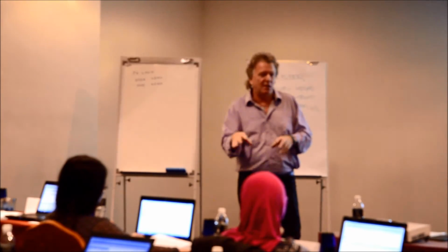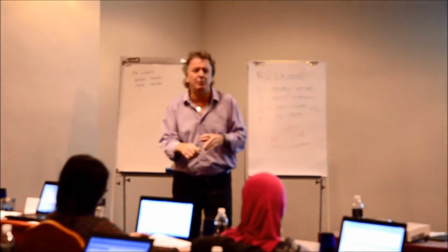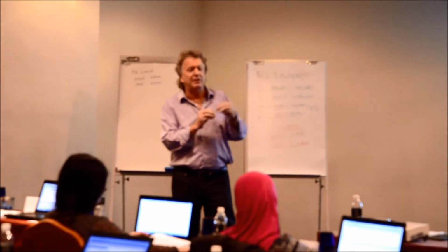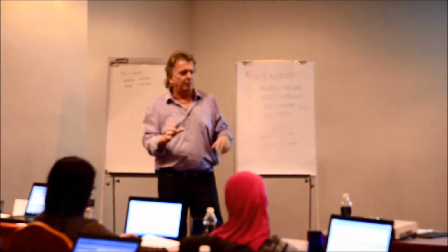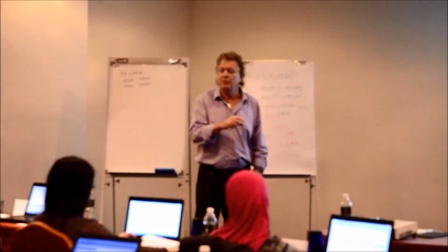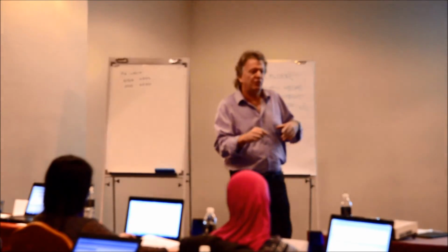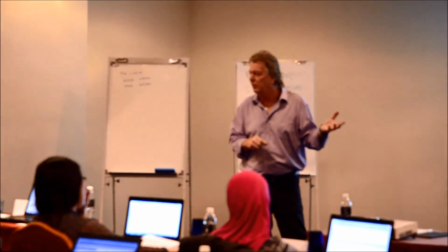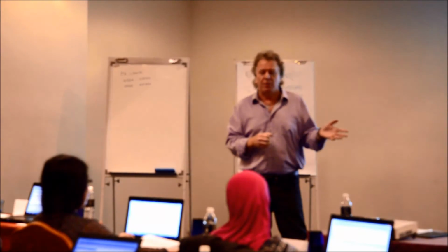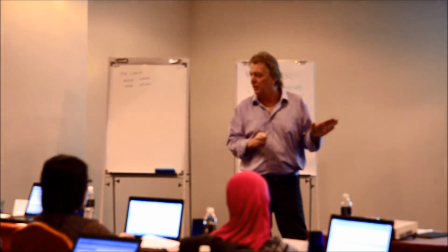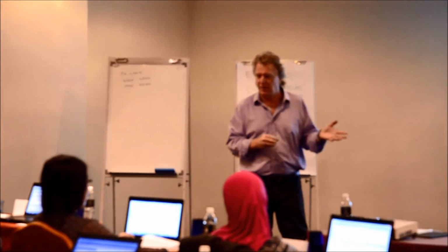They cannot work in isolation, like in a vacuum. They need the logistics plan, the execution plan, the communication plan. They need the strategies from contracting strategy and resource strategy to put into the computer to produce an overall project plan. So you're going to hear me talk about project plans versus the schedule, because you cannot produce something in the future like the look ahead. Have you heard of look ahead schedule? That's one thing we're going to try to unlearn in this training. We don't do look ahead. If you can predict what you're going to do in three days from now, you might as well buy a lottery ticket, because you can see the future.